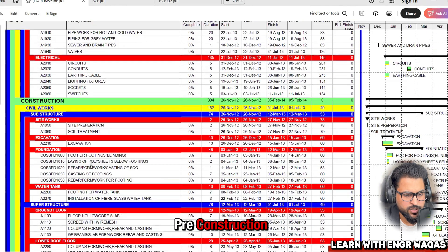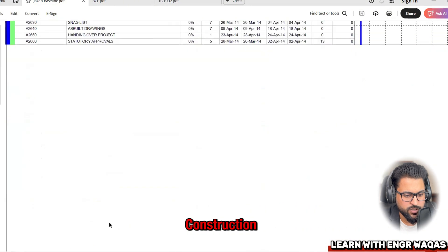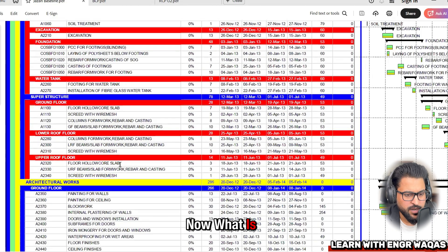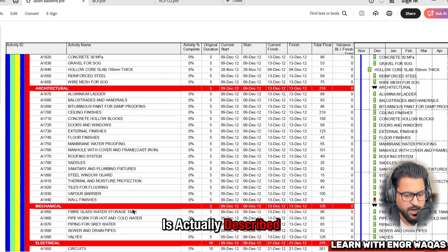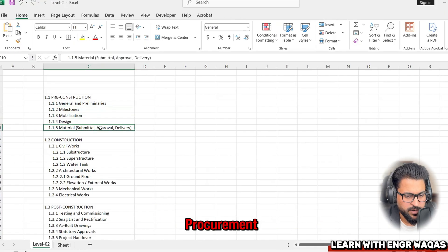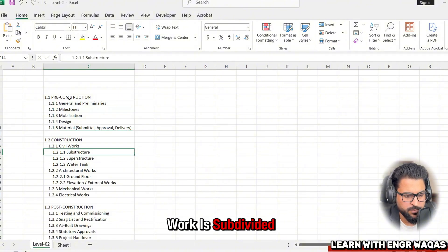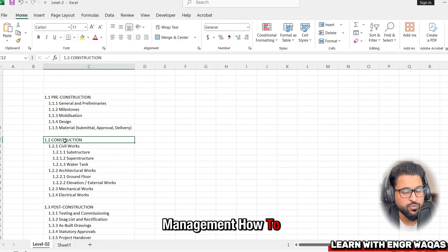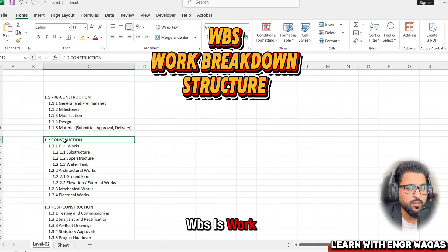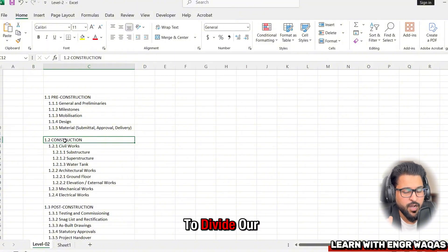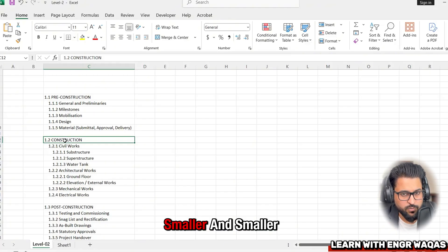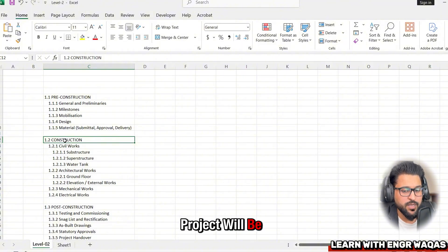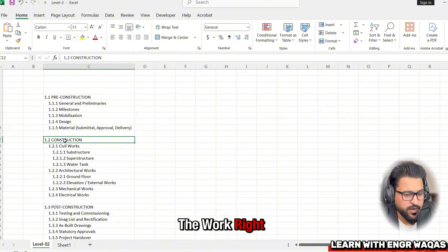Level 2 is described in the Excel sheet and includes general and preliminaries, milestone, mobilization, design, and procurement. Within construction, civil works is subdivided with coding — for example, 1.2.1 is civil works. This breakdown comes from scope management using WBS, the Work Breakdown Structure, which divides the project into smaller and smaller components so that work quantities can be calculated.